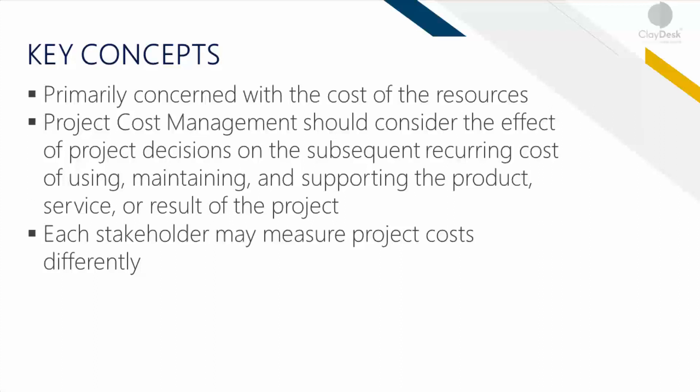For example, a limited number of design reviews can reduce the cost of a project, but at the same time could increase the resulting product's operating costs. Different stakeholders measure project costs in different ways, and you need to understand the level of those stakeholders and their expectations. Another example is that the cost of an acquired item may be measured when the acquisition decision is made, the order is placed, the item is delivered, or the actual cost is incurred or recorded for project accounting purposes.